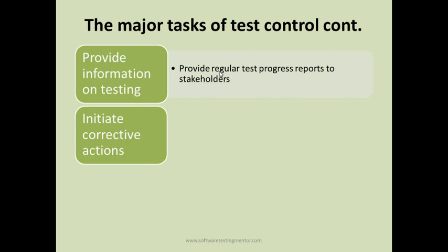These are some of the corrective actions that you can take. You can either spend more time per day, or hire more resources, get more resources to execute the test cases so that you don't miss the deadline.